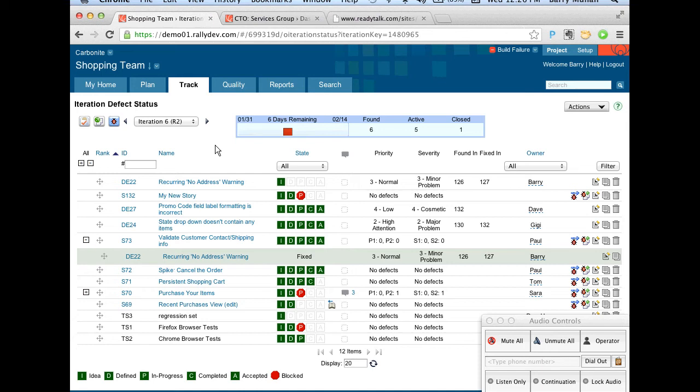And you'll see the range broaden between what's accepted and what's not accepted or in progress. But that's because you accepted stories, and then found bugs after having accepted the story. If you haven't accepted the story because you found a bug associated with its completion, it shouldn't be scope creep. It should be that the story isn't done yet because I found a problem with the way you implemented it.